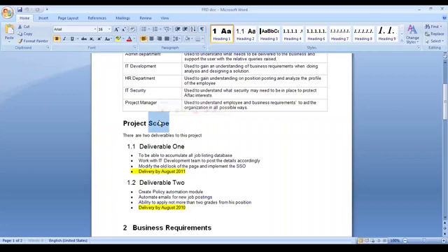Yes, exactly. Perfect. Okay, so whenever you define a project scope, that should be signed by the client, the respective stakeholders. Once you get a sign off, only then you proceed with that. As I said, we are doing it in bits and bytes fashion as of now. Once you're through with BRD and SRS, you can link all of them. Correct. Okay. Any more questions?